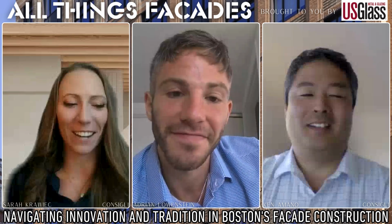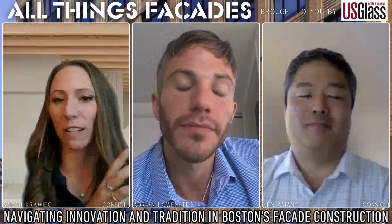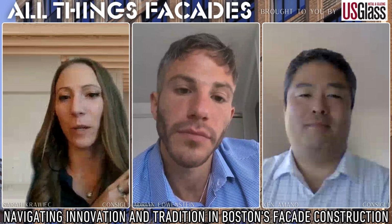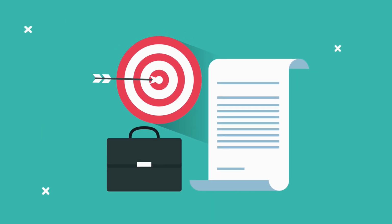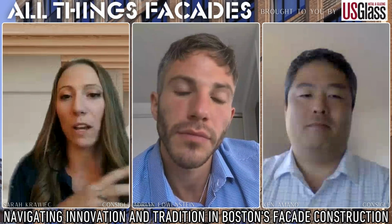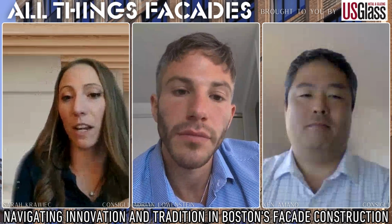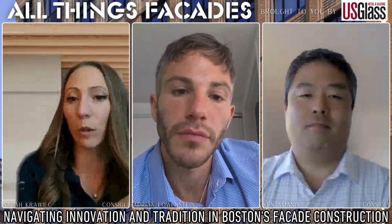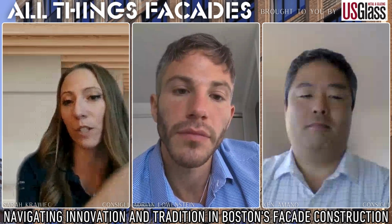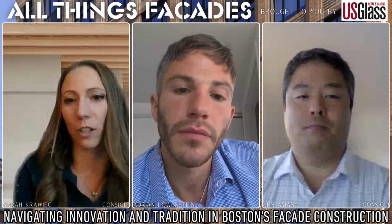Right. No, I have noticed a trend, at least from my experience, is that we are now shifting the conversation to earlier on in the process, right? Especially with the Boston area, we have a lot of building requirements or these certifications like LEED, Passive House, and those types of buildings is actually a different way that we construct in the field. For example, we need to get early buy-in on the AVB and what types of facade testing. Are we going to do a blower door test? How are we commissioning this building in order to meet that criteria? So to your point, we are having a lot of conversations early on.